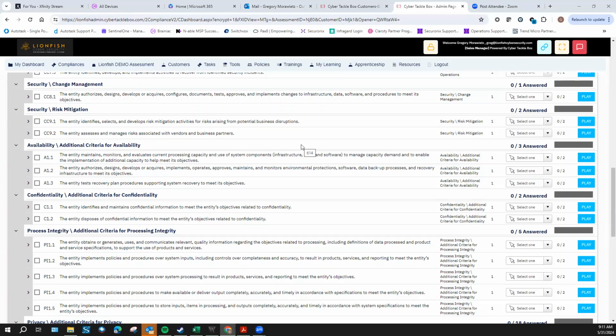But you need to ensure that you mitigate risk and that you go over all the different kinds of risks that could occur. One of the risks that I found interesting was that some currency in a foreign country was fluctuating, and the company identified that as a risk. So they reduced the amount of money they had in the bank there, due to the risk assessment, in order not to lose value in that money.